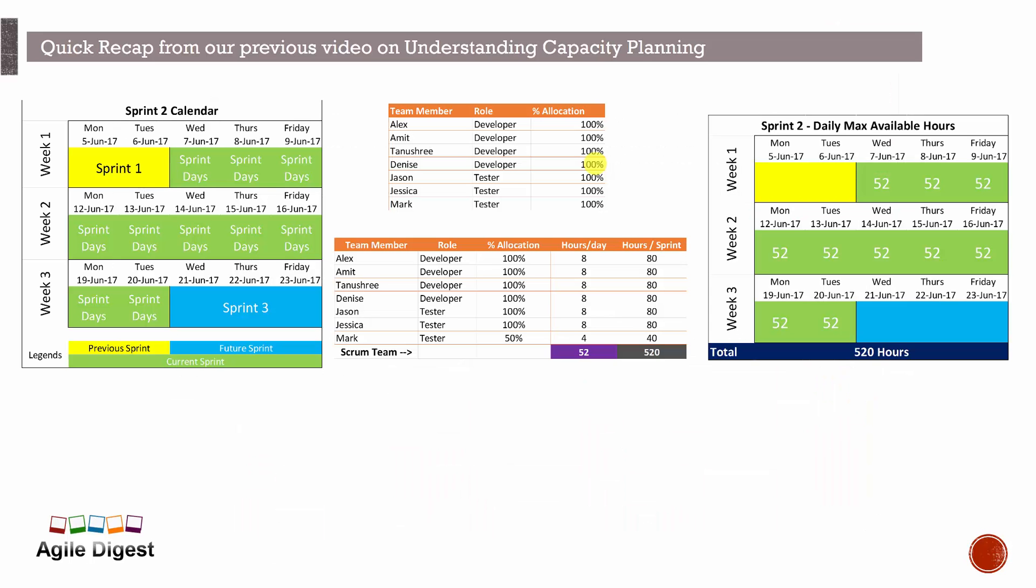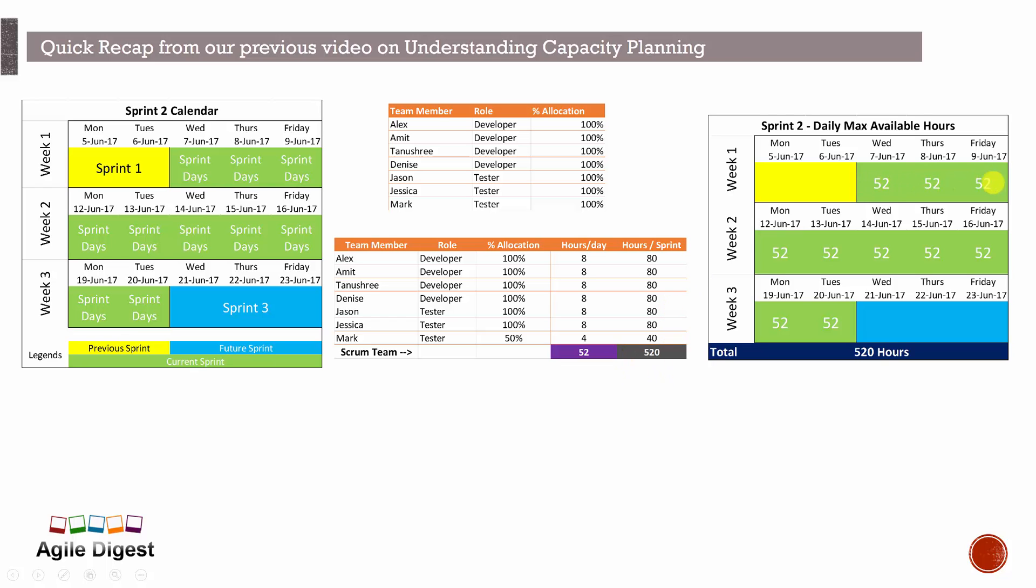So here our sprint is starting on 7th of June, ending on 20th of June. We have 10 days of sprint and these are the team members: we have four developers, three testers, and their allocation is let's say 100 percent and 50 percent for one of the testers. So total it was coming to 52 hours per day for the entire team and 520 hours for the entire team for the sprint, and each day the capacity is 52 hours.